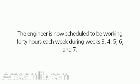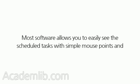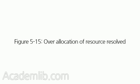Notice that this solution makes the utilization of our engineer much better. The engineer is now scheduled to be working 40 hours each week during Weeks 3, 4, 5, 6, and 7. Using the resource histogram is quite easy. Most software allows you to easily see the scheduled tasks with simple mouse points and clicks, as shown in Figure 5-15 — over-allocation of resource resolved.